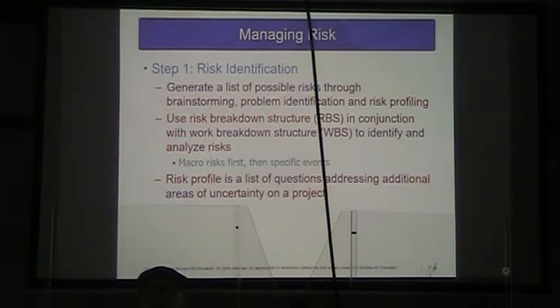But we should get our team together and say, all right, what are some risks that we might have? And again, when we're brainstorming, no idea is thrown out. Every idea is written down. So someone says an asteroid striking our facility, we write that down. We may throw that out later, of course.